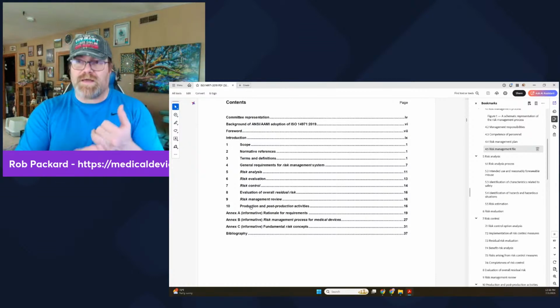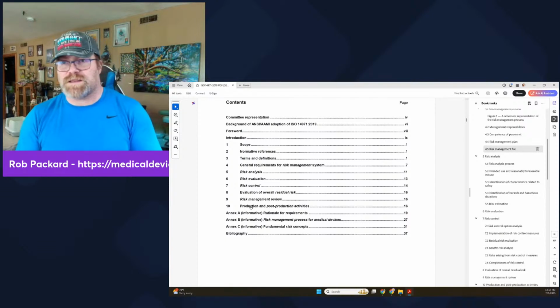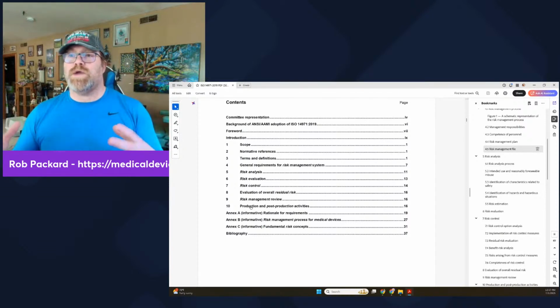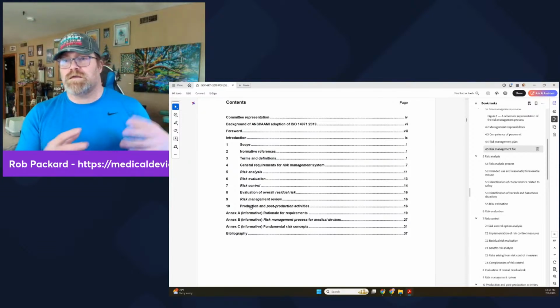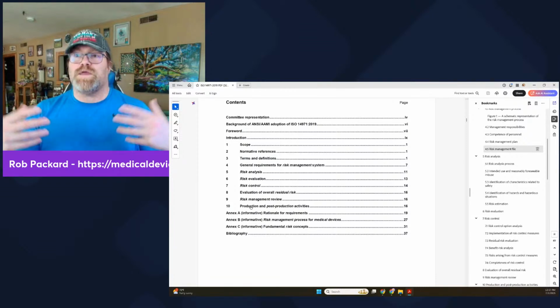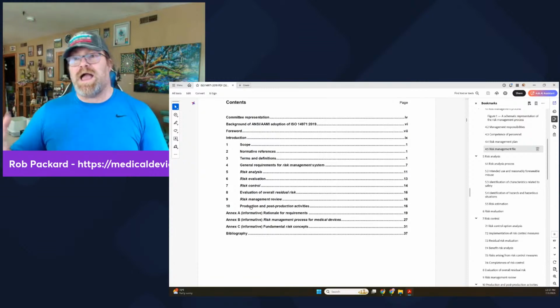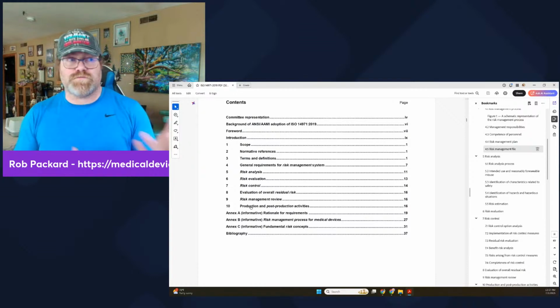So you had the design FMEA, you evaluated multiple different risk controls, you picked the final ones, you documented them, you did your V&V testing, you did your benefit risk analysis, you've done every activity that was in your plan. Now you have a risk management review at the end saying, yes, we did all our planned activities. Here, each one is perfectly documented, and we have a conclusion about it. We identify some post-market things that we want to monitor and how we're going to monitor them. You might even release a post-market surveillance plan for the risk.